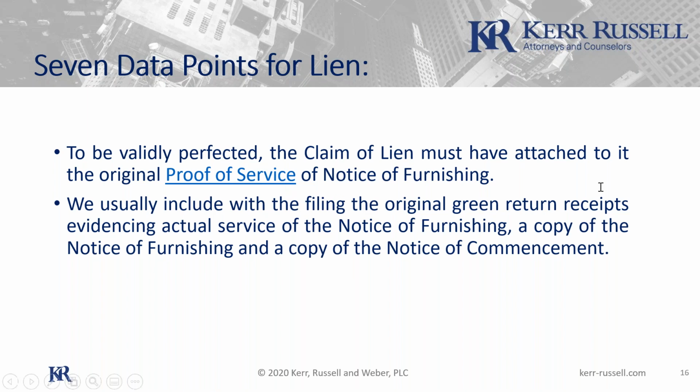Okay. What I want to emphasize with regard to the lien filing deadline of the 90 days is that it is very strict. For instance, you wouldn't want to rely on mail to send it in. There's a case where someone mailed it in, then there was some kind of snafu, the mail didn't get delivered, they got notice of it, and they sent it in by mail again. This is all before the 90 days expired, but it didn't get there in time, and so despite all those good faith efforts, they lost their lien because the 90-day is such a harsh deadline.